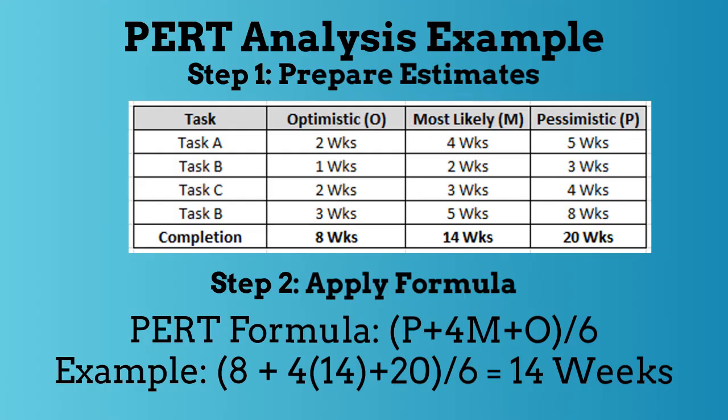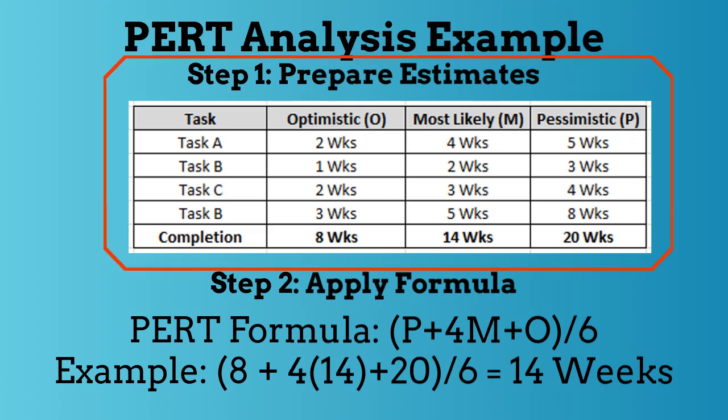This slide shows an example of a PERT analysis. Step 1: develop three different estimates for optimistic, most likely, and pessimistic for each task. You can see these estimates inputted into a chart for tasks A, B, C, and D.